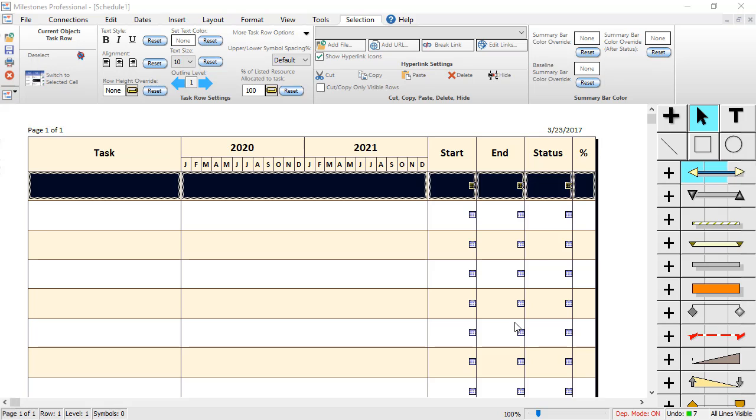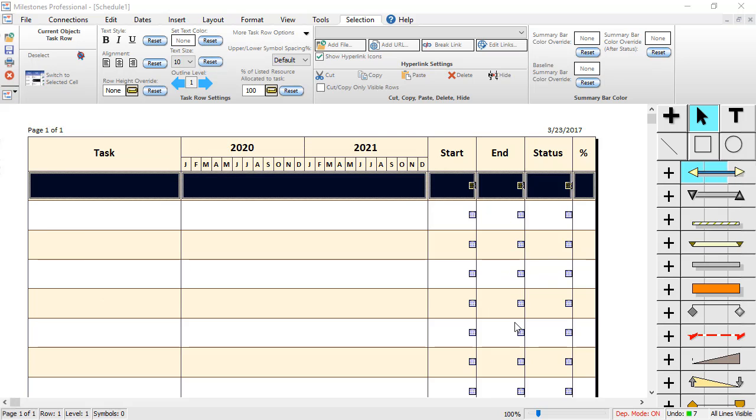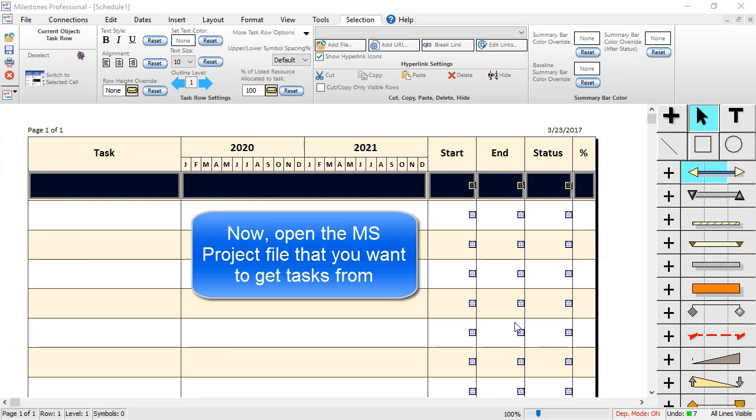First, make sure your date range in Milestones Professional matches the tasks that you will be getting from your MS Project file. Then, open the file up in Microsoft Project that you will be getting tasks from.